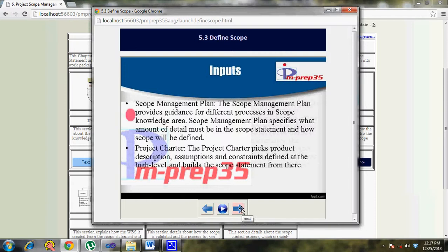Now, as part of this process, what you would do is product analysis. Product analysis is nothing but looking at what will form my end product. Don't imagine an end product would always be a single product, but there might be multiple components that can be part of that end product. So that's where you will do product analysis, as well as some benchmarking. You do product analysis to see what the components or subcomponents are to create the end product. So product analysis is really important.